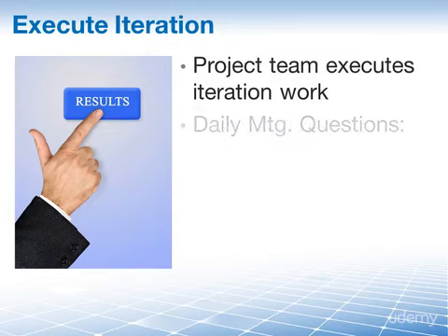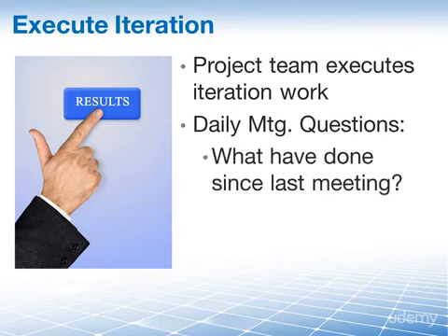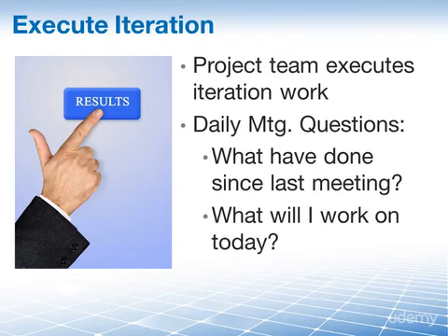The project team members normally also attend a daily team meeting, which is referred to as a daily stand-up meeting, to help keep them focused, where each team member answers 3 questions. What did I accomplish since our last meeting? And here the individual states the specific tasks that they completed since the last meeting. What will I be working on today? The individual here states the specific tasks that they will be working on for the rest of the day, to be continuing the work or maybe starting on another task altogether.